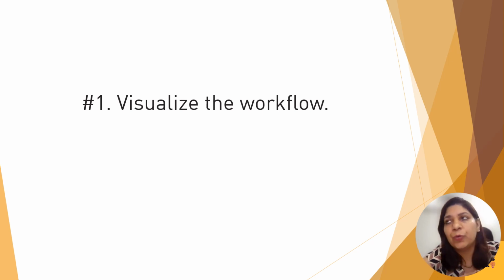Maybe hire more reviewers, or maybe help whoever has done the work to start also reviewing the work. Maybe peer reviewing could help out. So we can try figuring out the solutions. It makes the work explicit to everybody, and everything that we are doing. What is the status of each work item in our project? That is how in Kanban, we manage work visually and collaboratively.